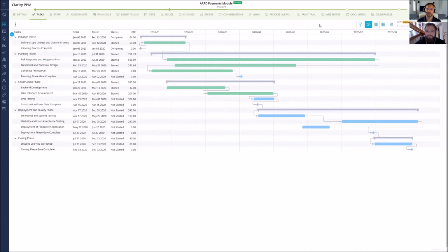I think there are advantages to both of the methodologies, and I definitely will not go into this discussion, because this will probably end up in a war or something like that. But I think there are some projects that just don't fit into an agile world. Like if you have a migration project to just migrate servers or whatsoever, you don't want to do that agile. You have to plan it up front, and you have a very defined endpoint. And I think all projects where we really need a very specific outcome at a very specific point in time will rather fit into a very classical approach.